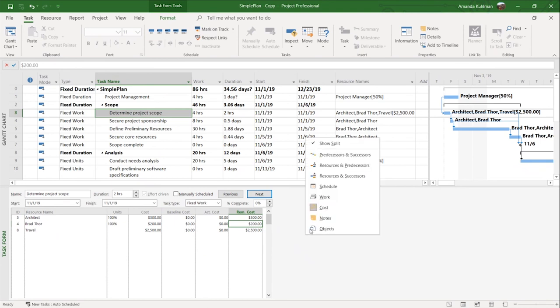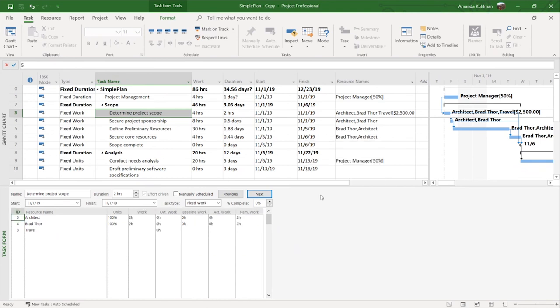The reason that in my work column here there is no work across, except for our overtime work here, across the board for cost resources, is that a cost resource does not have any work associated with it. It is purely a cost identifier holder, a way to relay additional costs that do not have an impact on the schedule. You can also update here in your task form if the cost changes, or you can also assign it here. Let's go ahead and remove our